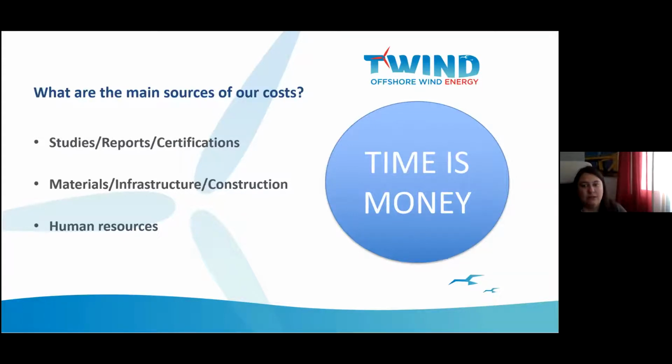And human resources, how will that affect every worker on the project? For example, having 50 people doing the work that could be done by 20 or 5 doing that same work is not the solution. When you're applying more resources than needed, there is a tendency to end up with more than one person repeating the work of another person. And when you have fewer resources, you end up spending a lot of time learning things that might not be needed again to cover the lack of knowledge. For every project, you will have to find an equilibrium between these two.